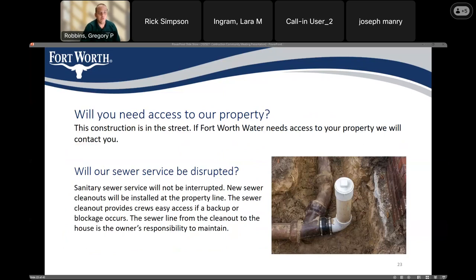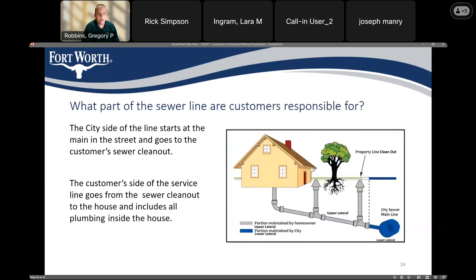A common question is whether we need access to your property — most likely we will not, but in the event we do, we'll contact you first. For the new sewer being installed, your sewer service will not be interrupted during construction. We'll be installing new services to each property and a new clean out at the property line. This diagram shows which portions of the new sewer line the city owns and maintains — the city will install a new sewer service up to the property line and install a clean out.